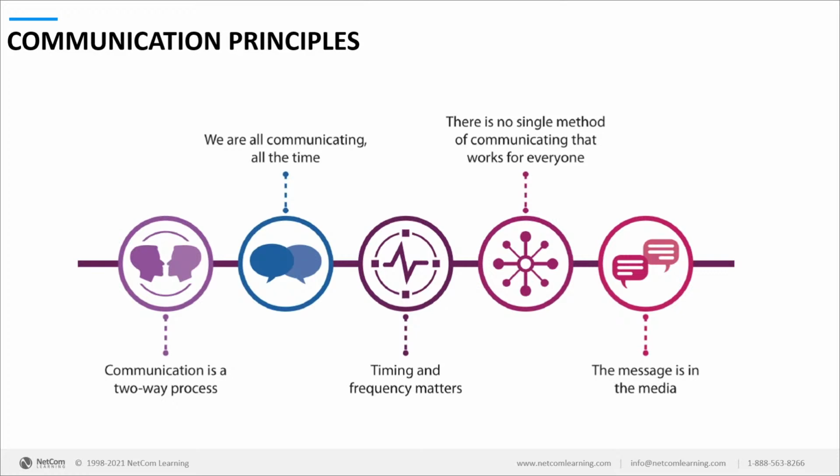We are all communicating all the time. Practically speaking, as per a survey done by one of the major project management organizations, a project manager or someone who's leading the development work spends somewhere around 60 to 70% of their time communicating.